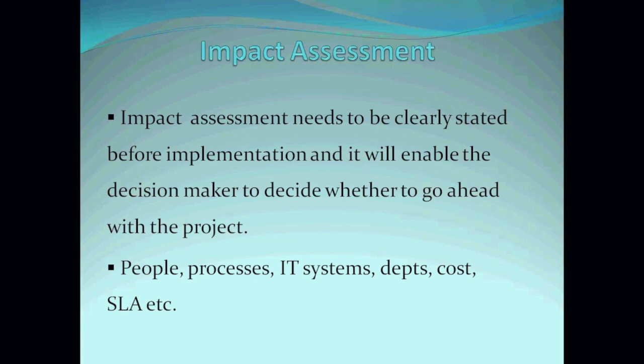What's it going to affect? So then maybe the decision maker or the project sponsor can say, actually, because we've carried out an impact assessment, we've identified that if we do this project, we will not be compliant with the GDPR or data protection regulation. So that means it's a risk. We've also identified that if we implement this project, we may have to employ about 5 more people to cover this area. And the outcome of the impact assessment could be that once they implement this project, they may have to change the systems or the application that they use at the moment, or get some new application.